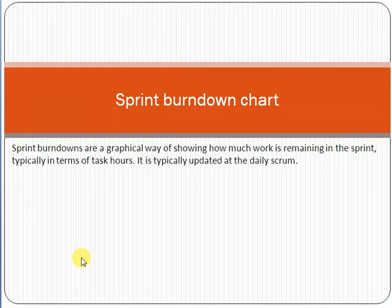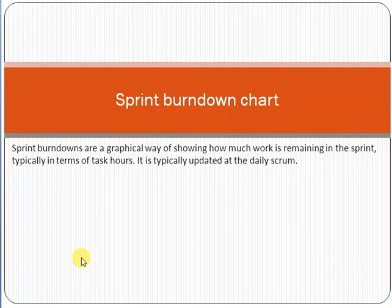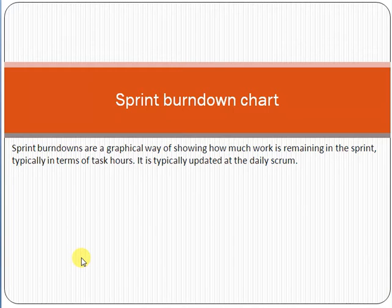When implementing projects using scrum, we have a product backlog — a document containing all the functional requirements of the customer. From the product backlog, we create the sprint backlog, which is a sub-document. For example, if there are 40 tasks in the product backlog, we take 10 tasks to form the sprint backlog. The scrum team then starts development and must complete those 10 tasks within the three to four week sprint.